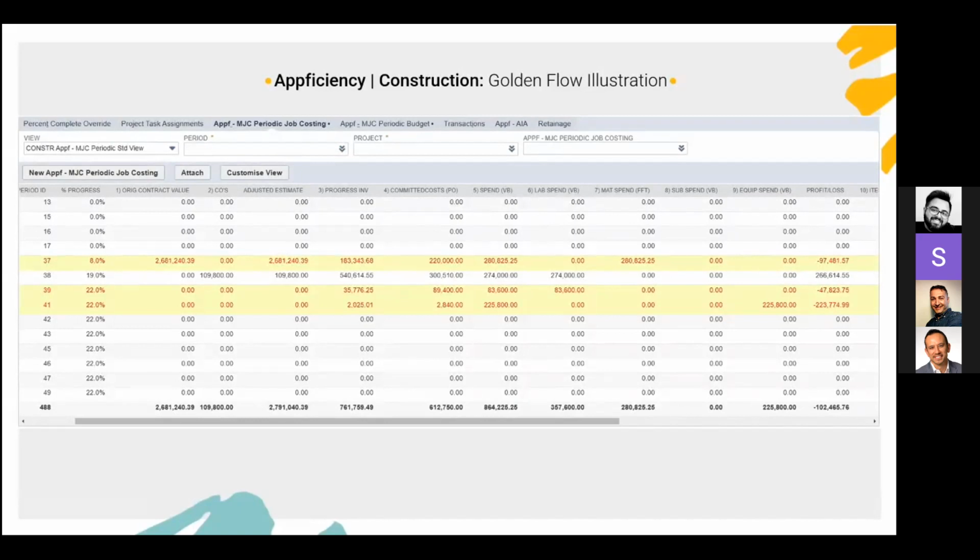So I committed $100,000 for an item in the month of April. Now, how much did they bill me and when did they bill me? So that would be technically your spend amount. And now, if you want, we can go even farther. We can say, hey, let us show you how much remaining budget you have in your hand in every one of these different periods that we can set up.